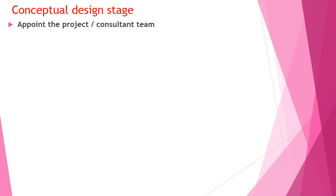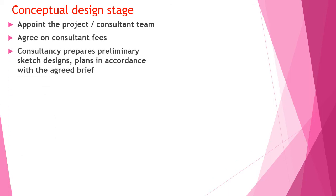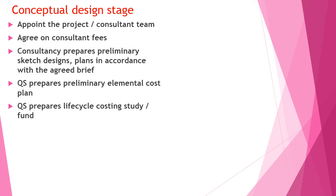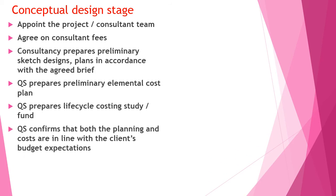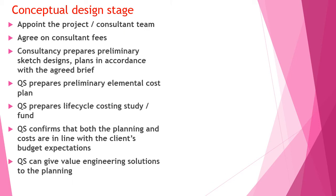In the conceptual design stage, appoint the project consultant team and agree on consultant fees. The consultancy prepares preliminary sketch designs and plans in accordance with the agreed contracts. Prepare a preliminary elemental cost, prepare a lifecycle costing study, confirm that both the planning and cost are in line with the client budget, and provide value engineering solutions to the planning.